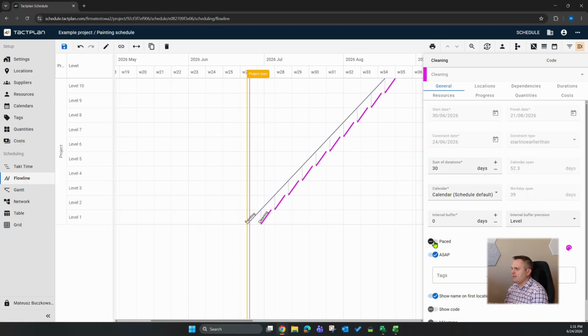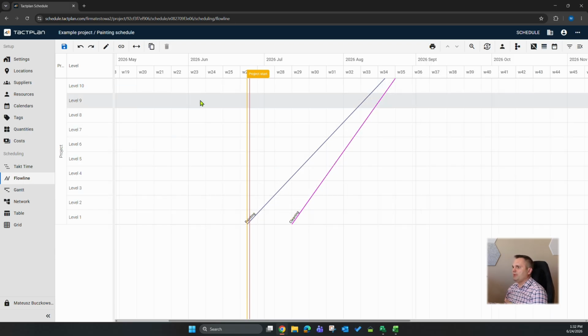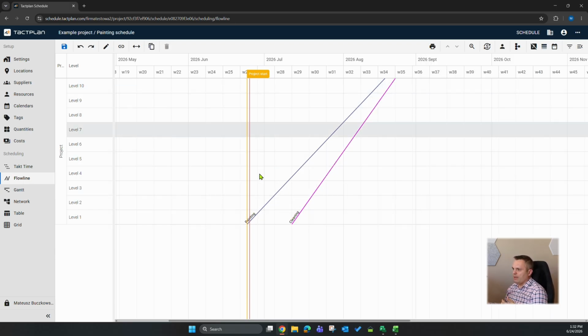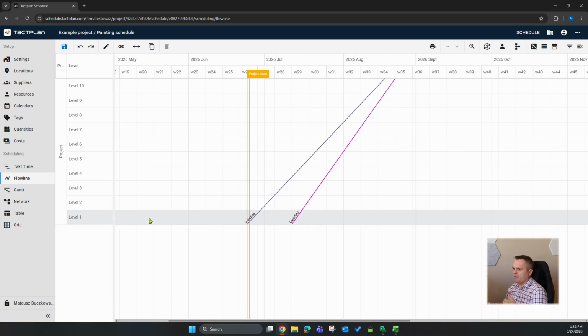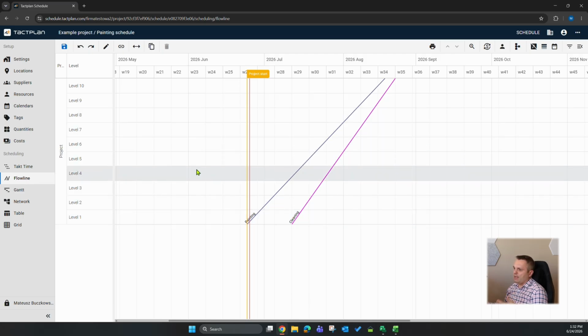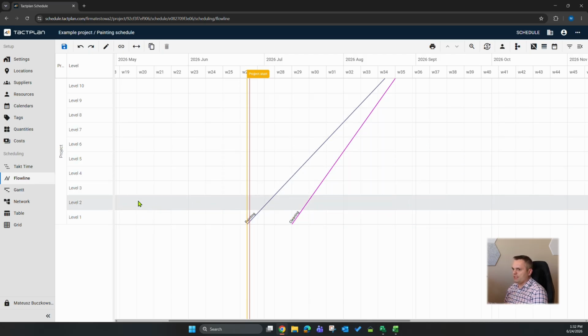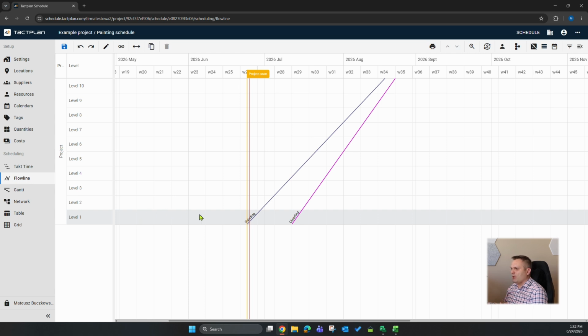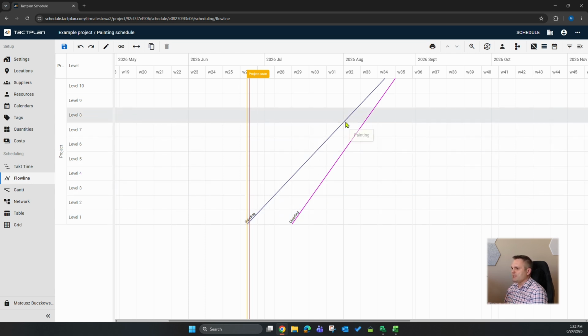We can avoid this by just switching on paste rhythm, and we see how late we can let them in just to finish it in an optimal way. And that would be this simple example showing why it's worth using this kind of views and location-based scheduling methodologies to plan our works and to avoid any collisions or non-optimal workflow.